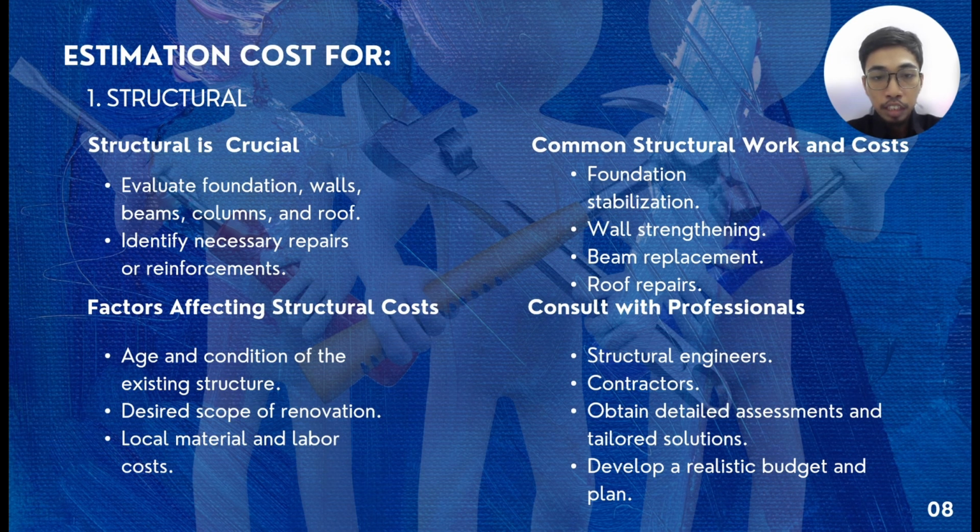Second is factors affecting structural costs: the age and condition of the existing structure, design scope of renovation, local material and labor cost. Next, common structural work and costs: foundation stabilization, wall strengthening, beam replacements and roof repairs. Consult with professionals, such as engineers and contractors, about the structural costing to obtain a detailed assessment and learn solutions, and develop a realistic budget plan.